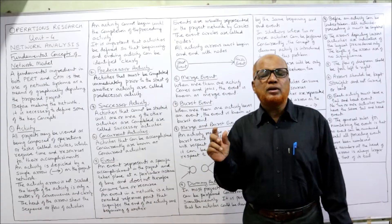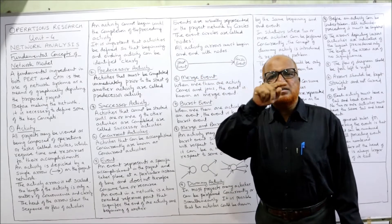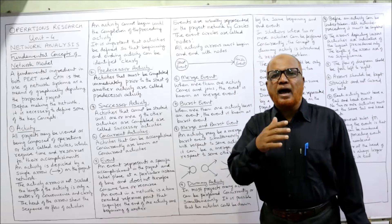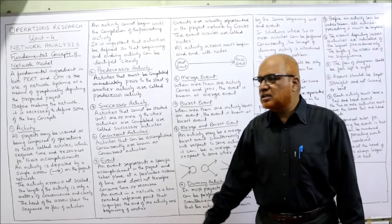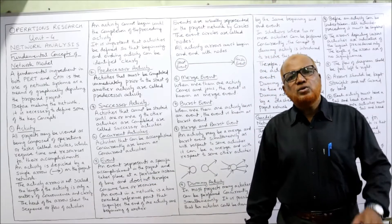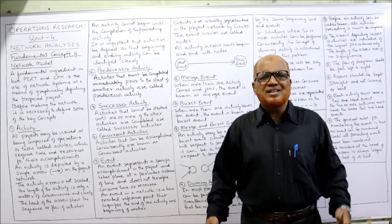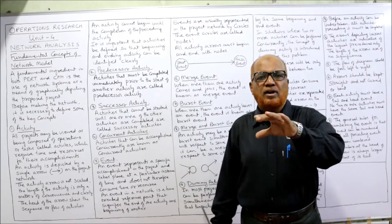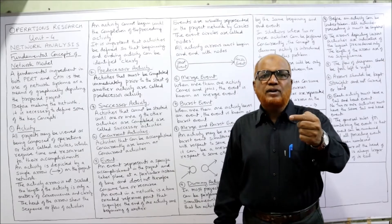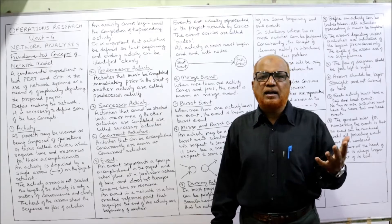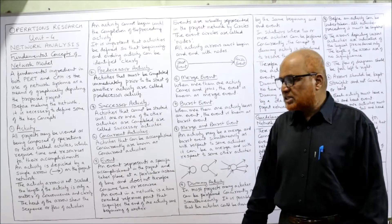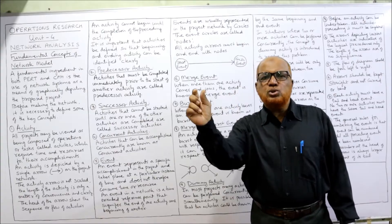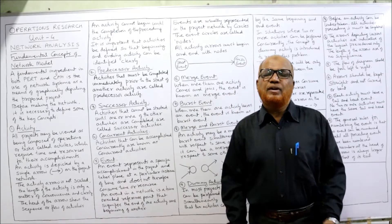An activity is depicted in the diagram by an arrow mark. In every network diagram you can see the arrow mark — head and tail of the arrow — that arrow mark shows the activity. Activities are represented by arrow marks in the network. The activity arrow is not scaled; the length of the arrow does not have any significance. It depends on your convenience and clarity. The head of the arrow shows the sequence and flow of activity.